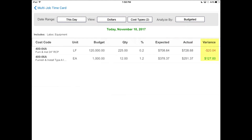The variance column all the way on the right compares your expected budget against your actual budget. So obviously if it's red, it's bad, and if it's green, you're on the right track. All of this information is right here for your foreman and your project managers can really easily adjust their reported quantities inside of Heavy Job as soon as they see any issues.